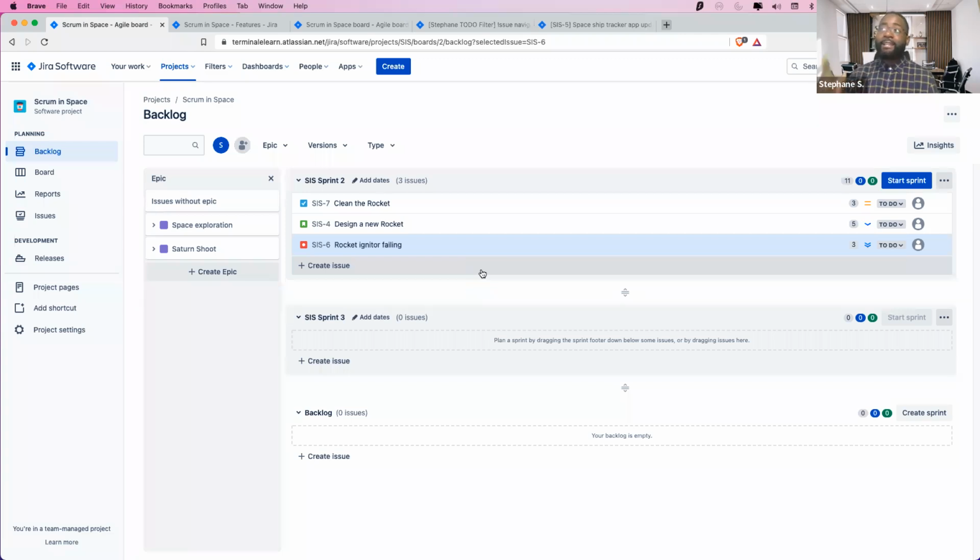That means that, with everything that we did before, there are 2 stories that one developer could do by himself, right? And if we assume that we had 3 developers, they could take up to 24 story points, that's it. So we could have taken 13, and then what? We have a 13, 16, 21, and 24. So we actually could do everything, assuming that every developer can accomplish 8 points a sprint. That means that the capacity of the whole sprint, assuming that nobody is going to be taking vacation, there's not going to be any time off, assuming they're going to be fully available, is 24 for that sprint.